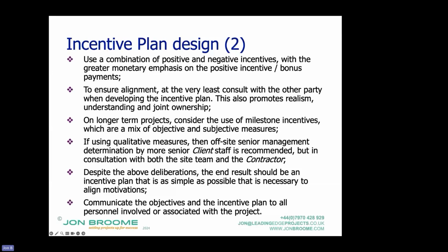If using those subjective or qualitative measures, then the best way to decide it is you need someone who's a bit, or people who are a bit, dispassionate from it. So off-site management, typically clients, client staff, but in consultation with the site team and the contractor.